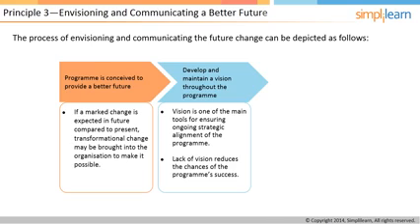The leaders of the program should describe this future as vision. Then the vision is further refined and developed in the early part of the program. The vision should be maintained throughout the life of the program with minimal changes. If the vision has changed significantly, it could mean that the program has been altered significantly and needs to be reassessed.